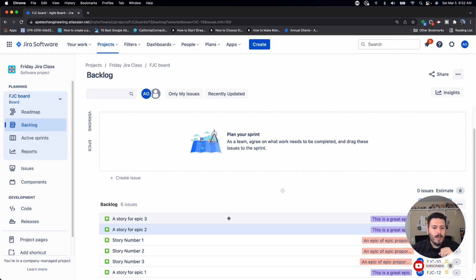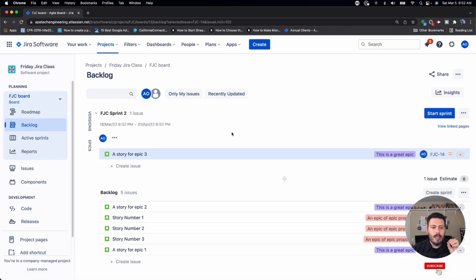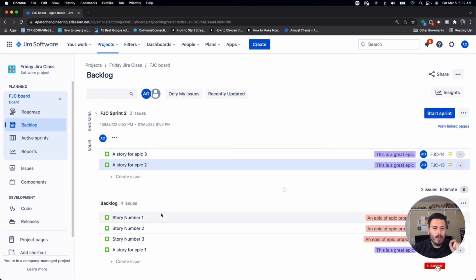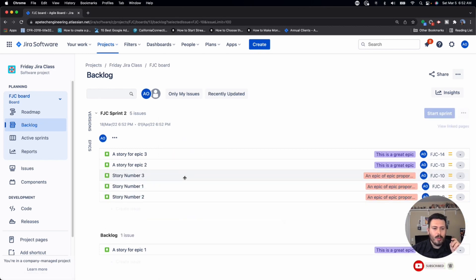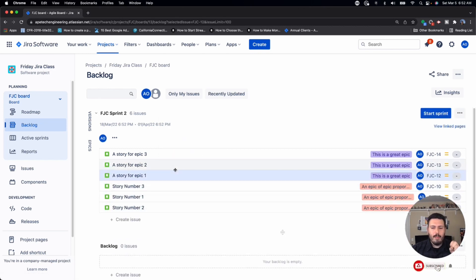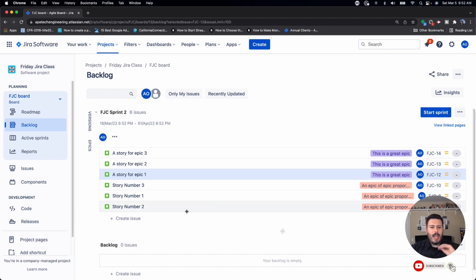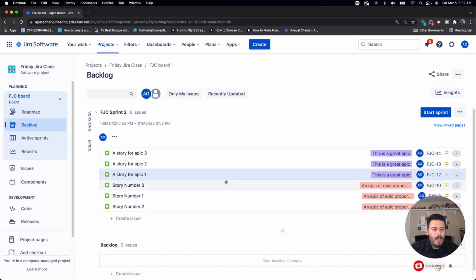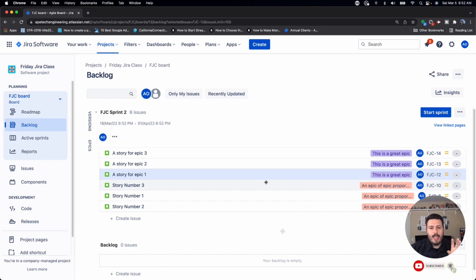To plan the sprint, super simple, you're just going to grab your story and drag it up to the sprint. That's one way. The second way is you can right click on it and send it to the sprint. There is technically an easy way of bulk doing this by updating the sprint field, but I like to be very selective. I like to make sure that as we're taking each item from the backlog, as a team, as a collective, we're consciously agreeing and making a commitment of like, yeah, this is something that we all as a team accept and we're going to commit to working on it. So that's the next step.